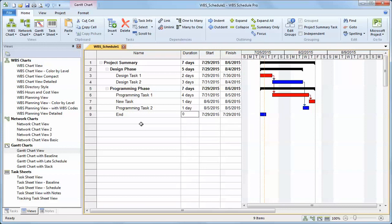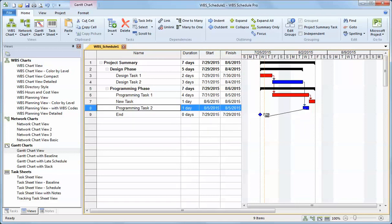I can create a milestone by simply changing the duration to zero. I can make links in the Gantt chart to my milestone. Let me try that again.